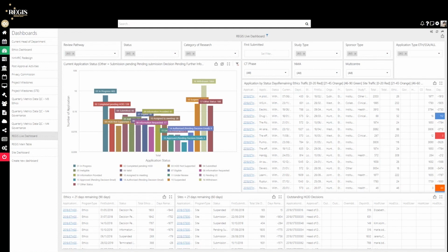And what we're going to also look at is overdue milestone status change. This is going to be a different dashboard, but I'll just quickly talk about that update we had in the system. So this enhancement looks for any pending ethics milestone progress reports that are greater than 6 months overdue. The system then automatically changes the status from pending to not achieved. And what it does is provide research officers with a true indication of active studies in the system, while also reducing the amount of milestone reminder emails that would be sent. The reminder emails were recently turned back on for progress reporting there.